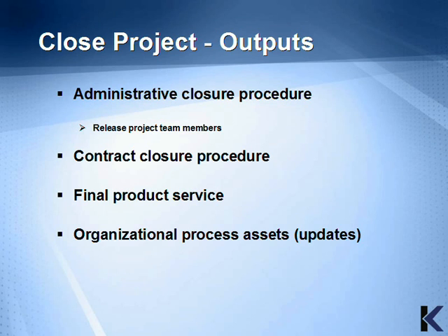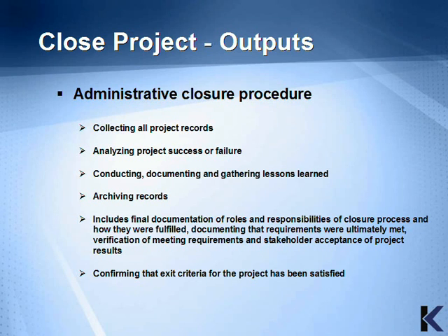Let's take a look at administrative closure procedures in more detail. This would include such activities as collecting all project records, analyzing project success or failure, conducting, documenting, and gathering lessons learned, and remember, lessons learned should be conducted at the end of each project's life cycle phase, not just at the end of the project.